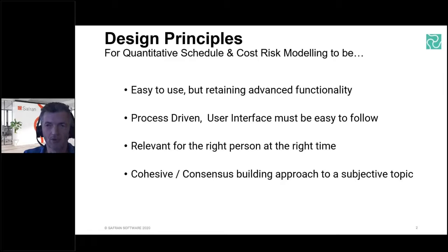So we went to great lengths to actually develop the sensitivity analysis, which does allow you to report the information in a way that everybody can buy into. So if you're talking about schedule and the effects a risk has on your schedule, then you talk about days, hours, or perhaps even minutes. And if you're talking about cost risk analysis, then you talk in dollars, pounds, euros, etc. So that's one way we've tackled this last bullet point on here.